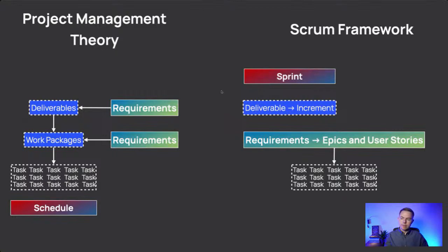It's reversed. We agree that we don't schedule our deliverables or tasks on a timeline. We say our schedule is just 2 weeks or 4 weeks per sprint, and there is only one deliverable. Actually, one deliverable is the increment. This is the additional generated value or new features that you introduce in your product or service at the end of the sprint. And that's why your requirements are not sitting outside. You're actually working with requirements, and you are breaking them down into tasks, which is counterintuitive because you want to break down the scope of work, the deliverables, into tasks to understand what it takes to create a product. But because we're using a simplified approach as the Scrum framework, we eliminate all that and simplify: a user story or an epic is a piece of requirement, and it's okay to estimate it using tasks and work from those tasks without any additional complications.